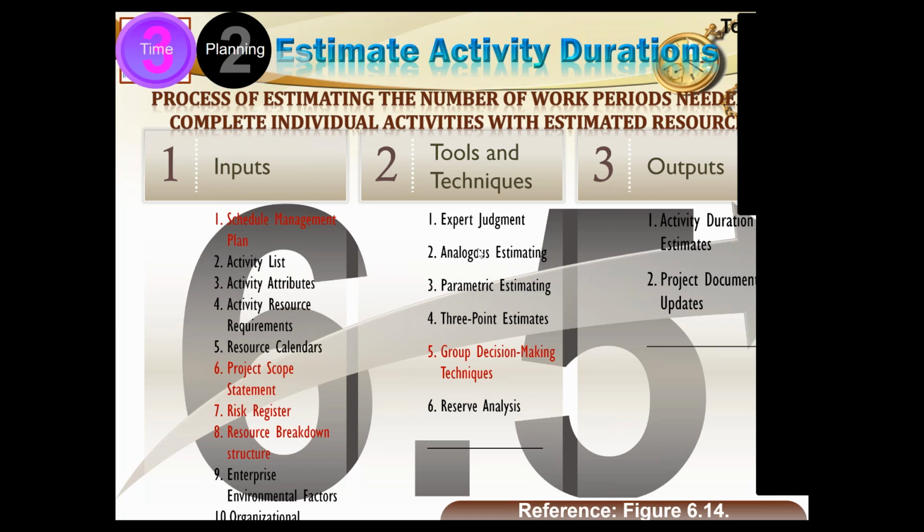But it is not necessary that the analogy is always equal in duration. The previous job I had done earlier may have been smaller in scope and it took 3 days. So in proportion to that, this job may take 7 days.